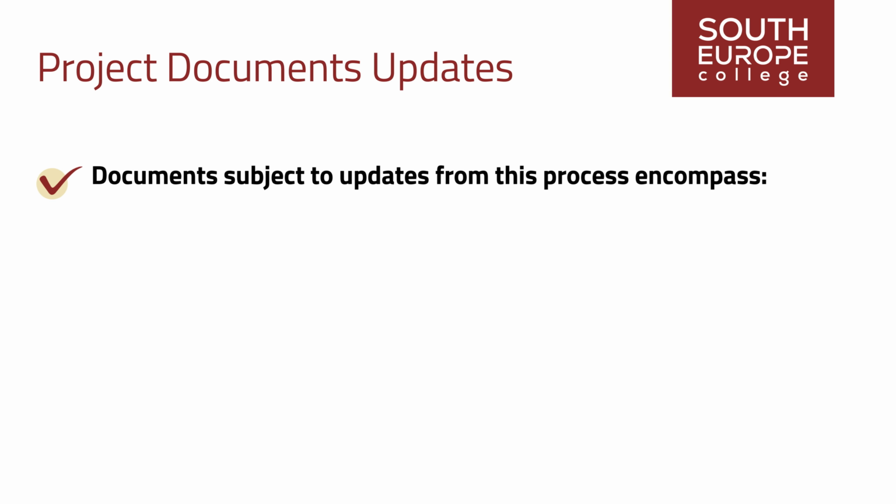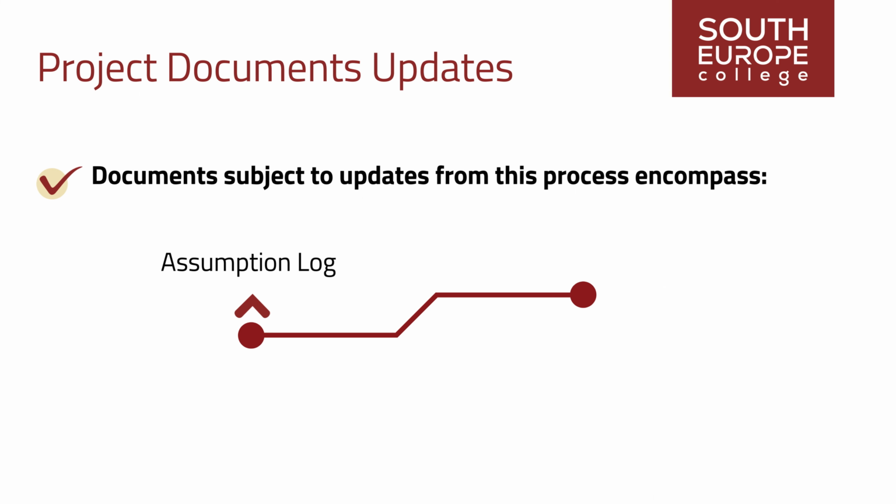Documents subject to updates from this process encompass assumption log, updated with assumptions regarding resource types and quantities, including any constraints such as collective bargaining agreements, continuous hours of operation, and planned leave. And lessons learned register, updated with efficient and effective techniques for developing resource estimates and insights on techniques that were less efficient or effective.